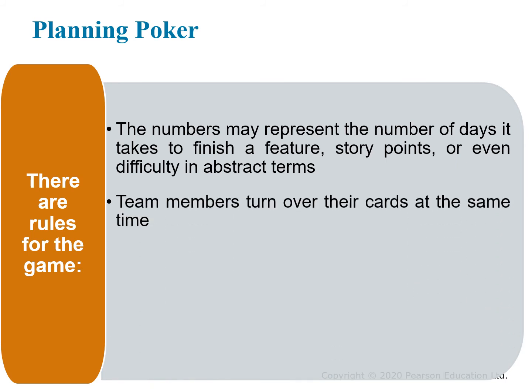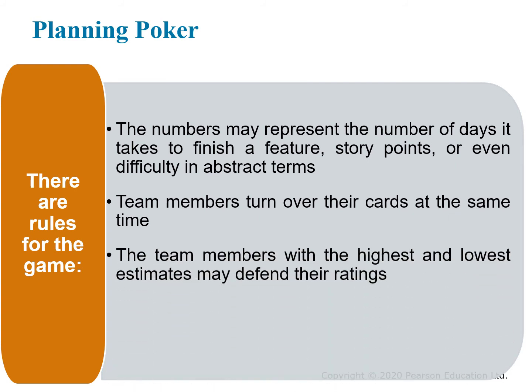Then team members turn over their cards at the same time, and then the team members with the highest and lowest estimates may defend their rating.